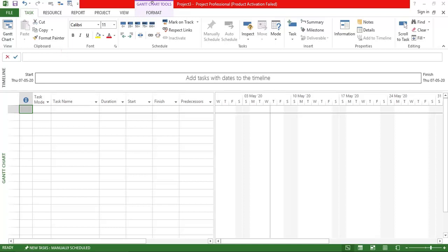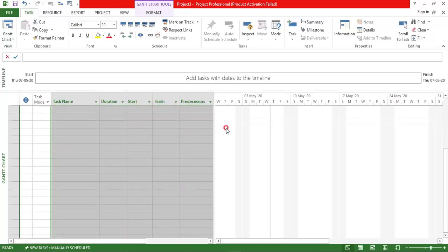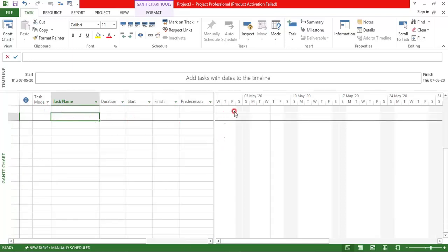What you are able to see is called your home page or the landing page. This is called the Gantt chart. Why? Because the Gantt chart is a combination of this entry sheet that you are able to see, as well as, along with your entries, you will be able to represent the graphical part of that, that is with respect to the duration. In the entry table, it will hold the listing of every task included in the project and will show the calculated details for each task.